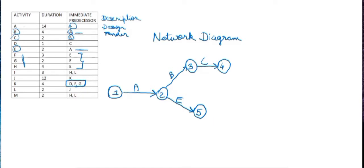F, G is the immediate predecessor of the activity K, so let's take one node where we'll connect the three activities which is F, G, and H. Firstly we need to draw activity D, then on this node only will connect the activities F, G, and H.